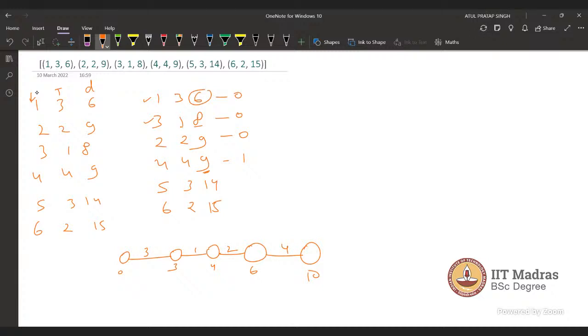Okay, so now we just added 3, so it becomes 13, and the deadline is 14, so we are completing before the deadline, so the lateness is 0. Now 6 is added to one more, so this is 15, and the deadline is 15, so we are completing at 15, so it is also 0.